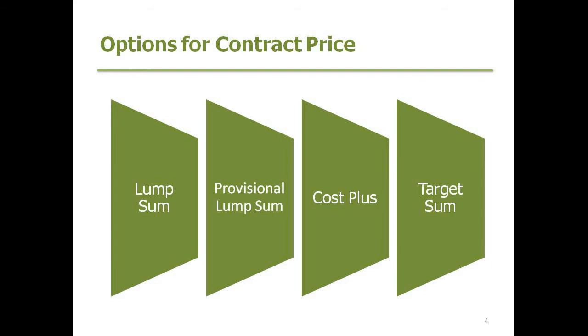You can only design so far, so the amount of work in demolition and services reintegration can only be assumed, and so the best way to look at that is to put in a schedule of rates there. But it's still a good form. The provisional lump sum is still a good form for predicting what the final cost of the project will be, and also predicting the timeline program.